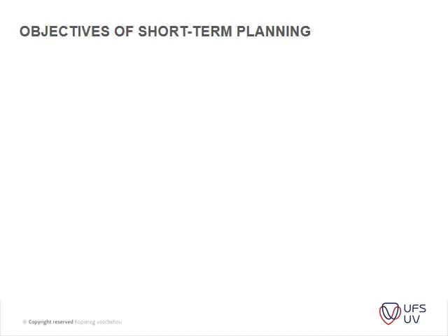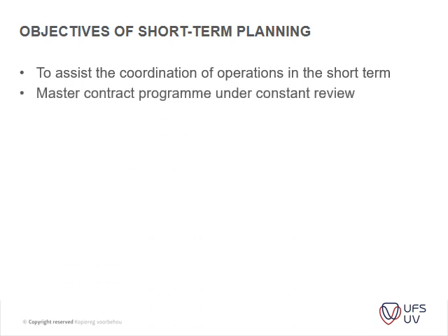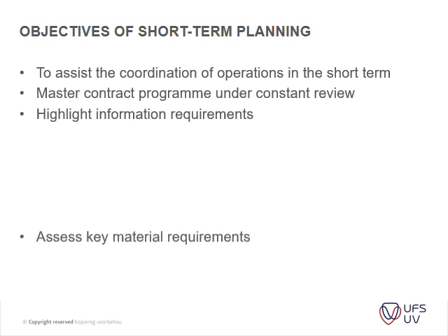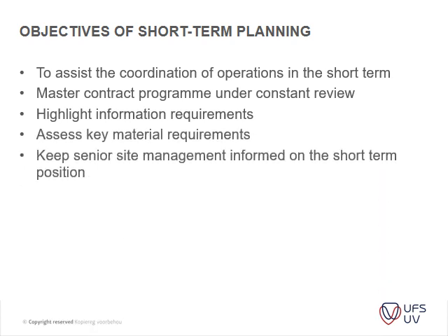Okay, then the objectives of the short-term program is basically to assist the coordination of short-term operations. The master contract program is under constant review, and then to highlight information required, assess key material requirements, and keep senior site management informed on the short-term position.